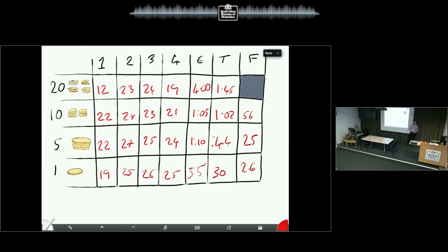In the first case, you send the whole delivery to the customer, and if there's anything wrong with it, if there are any defects or it wasn't what the customer wanted, then you've wasted all of that effort and you have to rework all of it. In the other extreme, this is called one piece manufacture, by the way, after 2.6 seconds, if the customer says that's not what I wanted, it's not so bad because we've lost this coin and four coins here, so five coins. Whereas in this case, we could potentially have 100 coins in the system, the 20 that you've just delivered, and then 80 in process. So the work in progress is much higher.